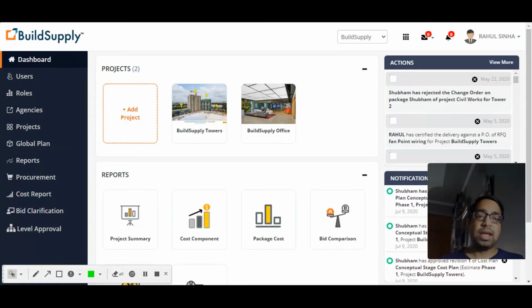In between, if there are any feedbacks or comments from the contractors, then we will do certain kinds of tender addendums. After that, once all the prices have been received and they are within the range of the estimated price which we have set for the contract to be awarded, we will create the recommendation report and then finally award the work order. So let's go.